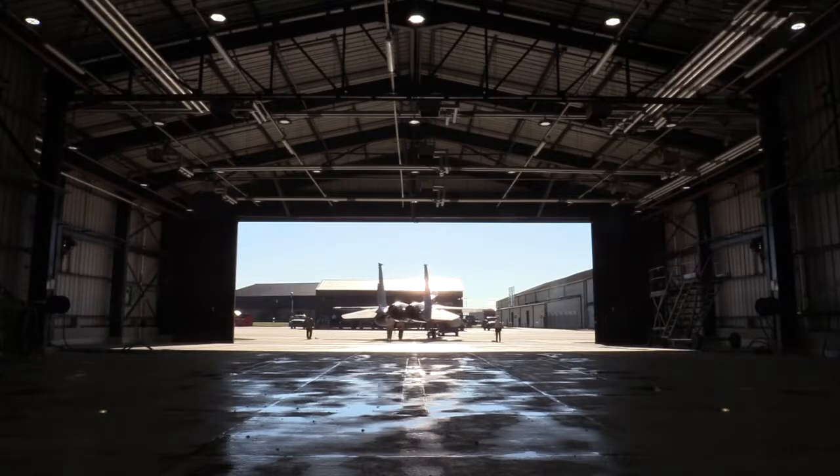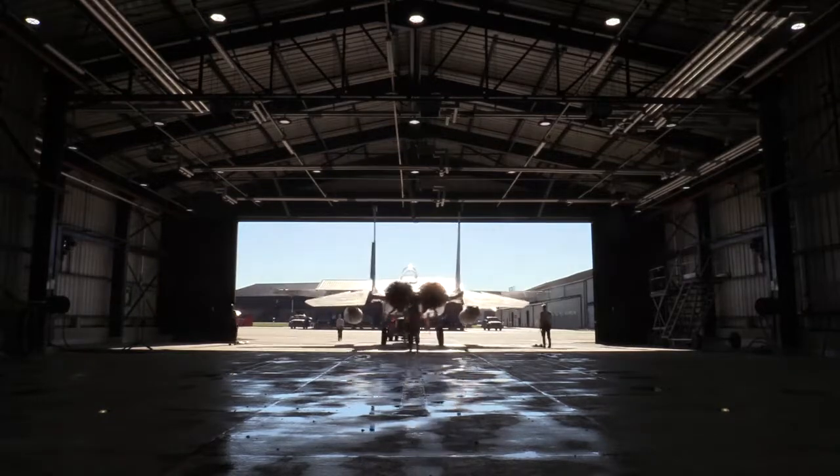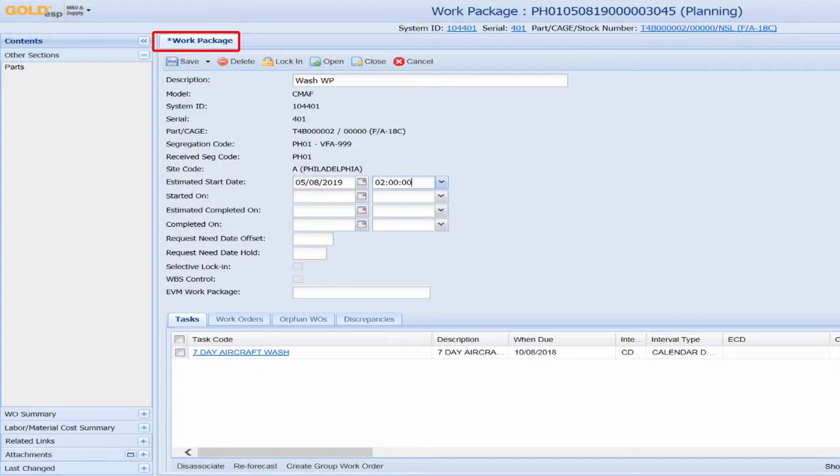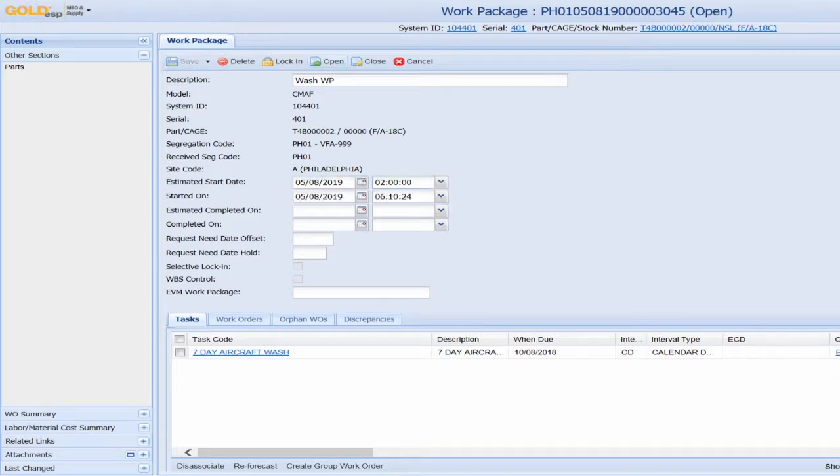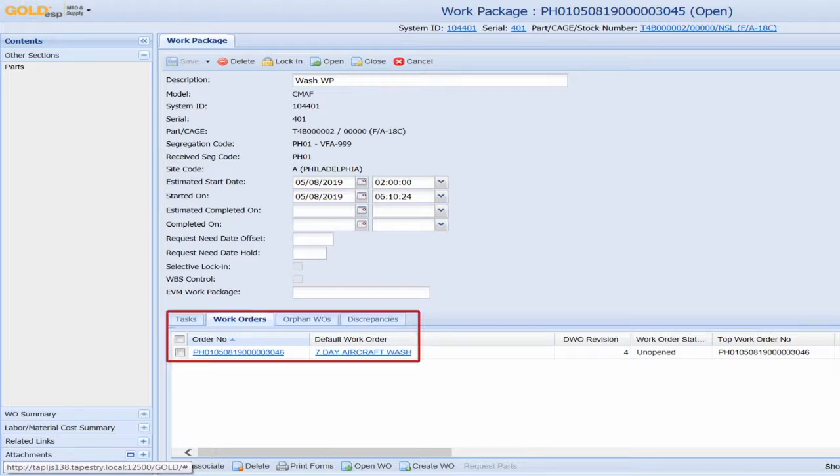If scheduled maintenance is required, users first create a work package with an estimated start and completion date. All this information is locked in to automatically create a work order for each task.